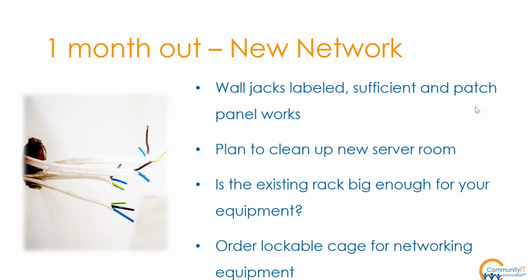And also, I can't say enough about the ISP. Sometimes ISPs will come to your building if they're not already there. It's important to factor that in, and a lot of times it's prohibitively expensive to have an ISP come in and bring a new internet connection. So again, make sure to check with your new building management to see what's in the building if you haven't found out already.